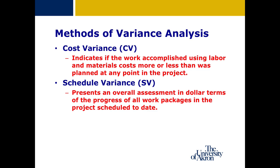The cost variance indicates whether the cost incurred today is more or less than what was originally planned to this point in the project — it tells you if you're under or over budget. The schedule variance calculates the value of all work packages or project tasks completed compared to planned, indicating whether a project is ahead or behind schedule. One important point is that this formula does not take into account whether a work package is on the critical path or not.